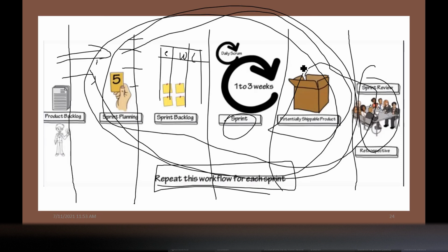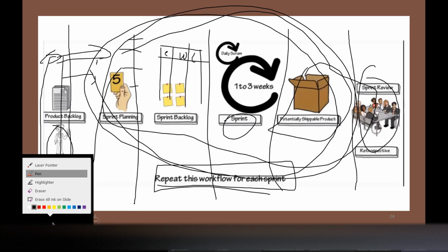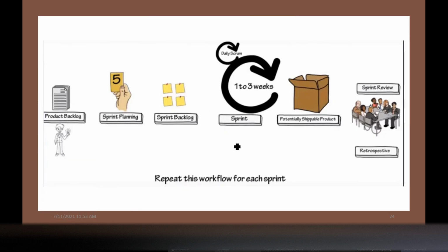Now think there's a modification, still it's okay. You will add it to the backlog, then your product owner would say no, this should be the highest priority, so it gets moved in here, and everything is pushed down again. This is not a very comprehensive subject, it's very easy, and I think now you have at least some rough understanding of this Scrum framework.